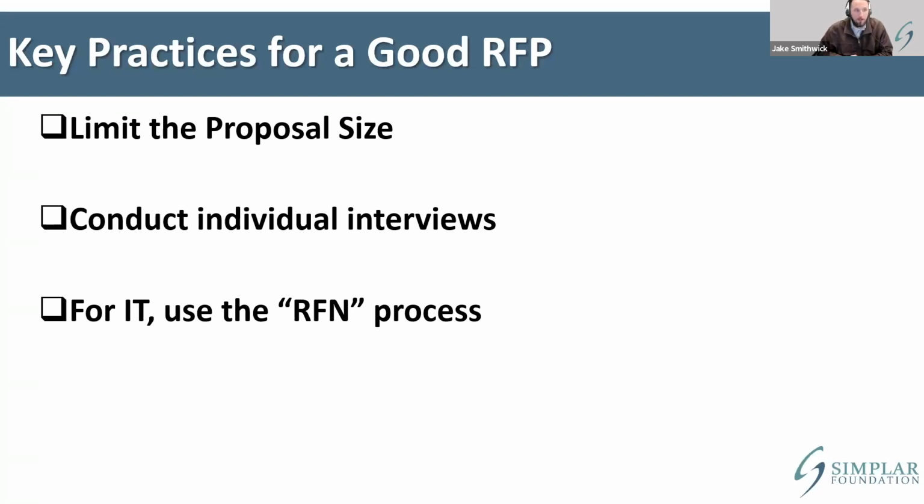It's not fun, right? Because first off, how often are you going to go through every single page in that giant proposal? The answer is nobody. The second thing here is our vendors don't like doing it. And if they do it, it's just a copy and paste job, which means it has no value to us. But the biggest reason why we like page limits is that it forces the vendors to highlight the key things that we're trying to explain on our proposals here. And so having those page limits helps us to focus in on the major things that we're looking at with this.